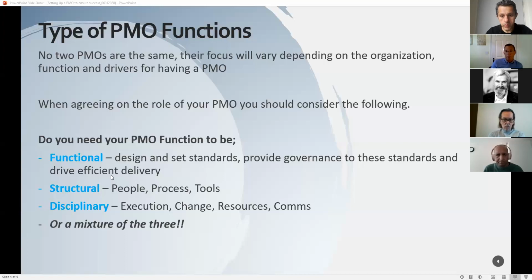And that was the very immature start off for a PMO function. That evolved. After we'd set the standards for the reporting and the timings, automated some of the inputs, and managed to win people over, we found out how we could review 112 projects in a 1-hour meeting, by prioritizing and giving everyone enough airtime where necessary, rotating, etc. It then evolved to, okay, we needed to have RAID control, change control, and reviews with the clients.